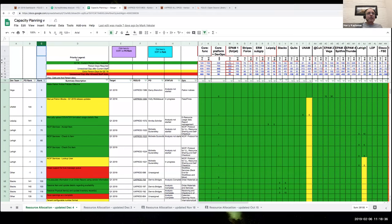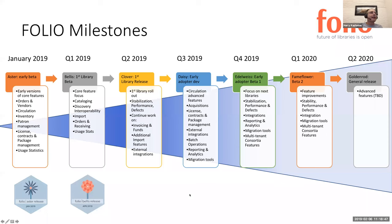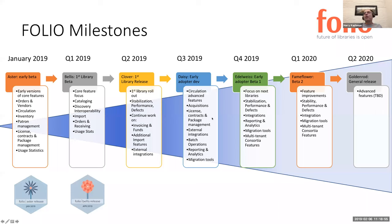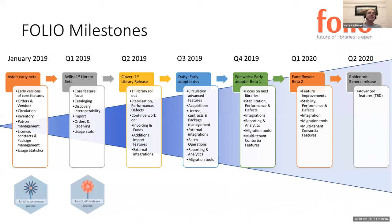And let me get back to the PowerPoint. So we're able to take all of this data and we end up with a distillation of all of that at a very high level, which gives us something like this. And these are the milestones that we're aiming for within Folio. This is broken down by quarter, as you can see. And then behind the scenes, there's this cone or triangle that goes from a darker shade of blue to a lighter shade of blue. That represents the cone of uncertainty.